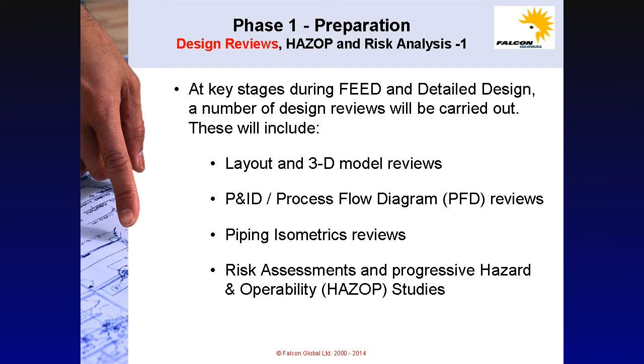Design reviews. At key stages during FEED and detailed engineering, a number of design reviews will be carried out. These will include layout and 3D model reviews, P&ID and process flow diagram reviews, piping isometric reviews, risk assessments, and progressive hazard and operability, or HAZOP, studies.